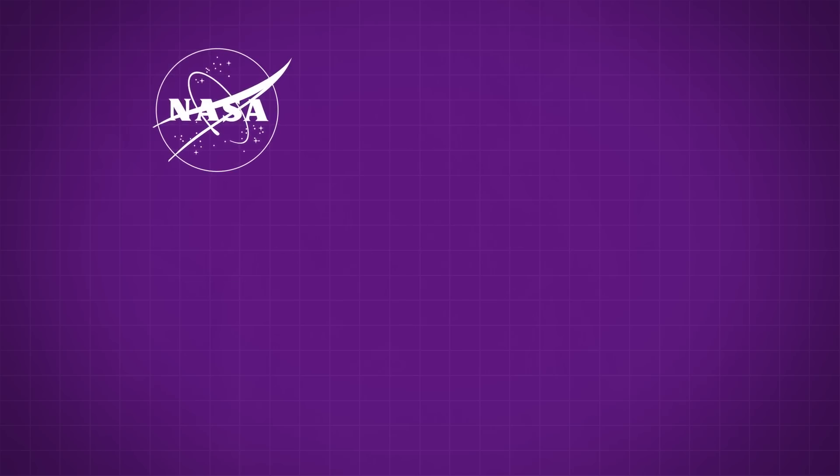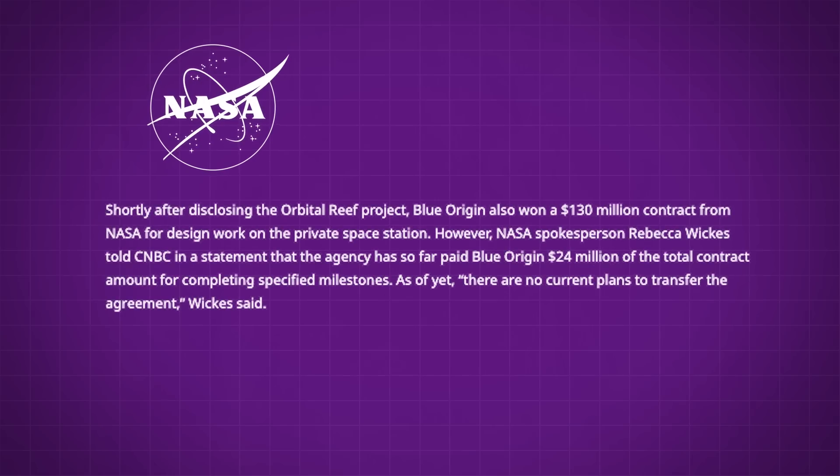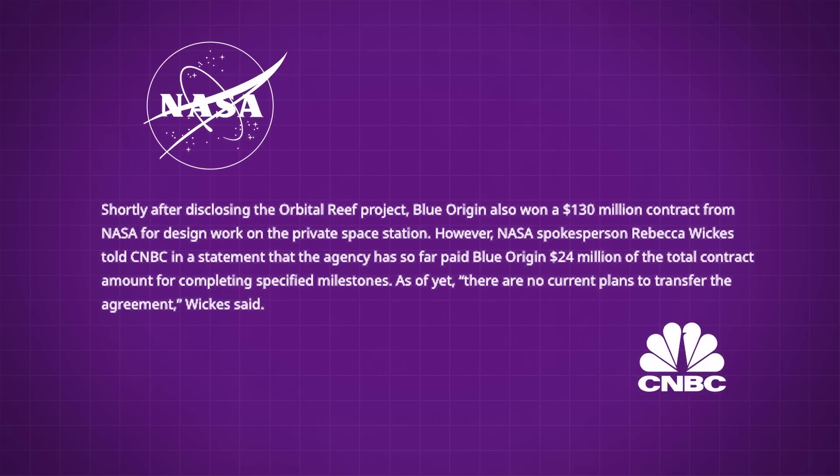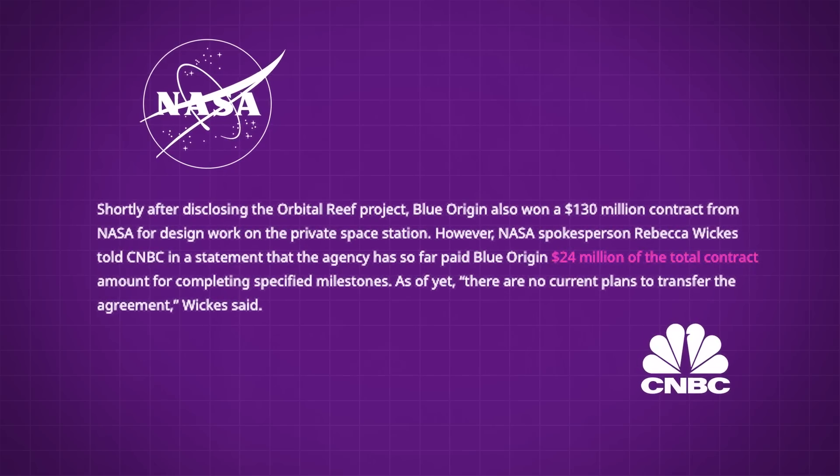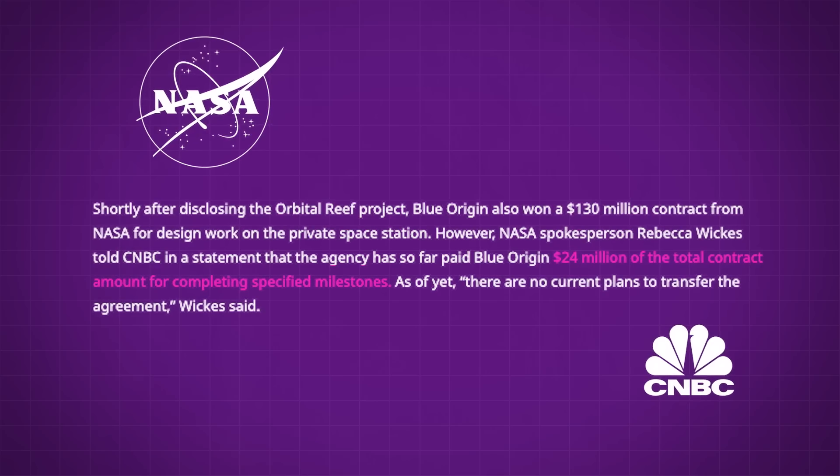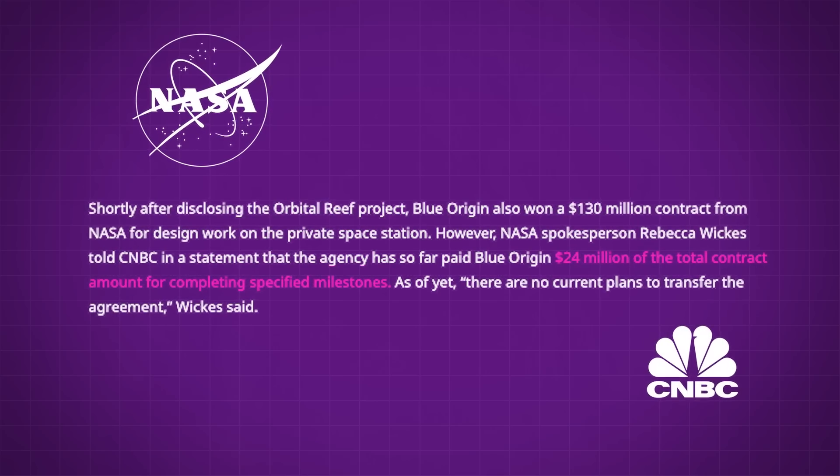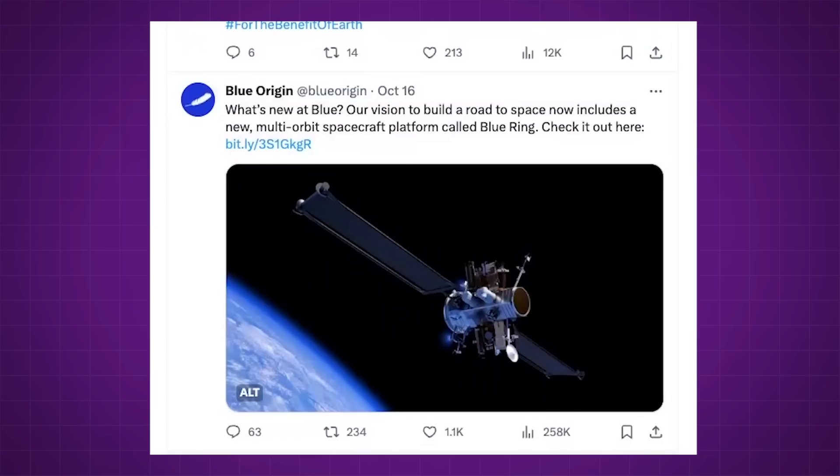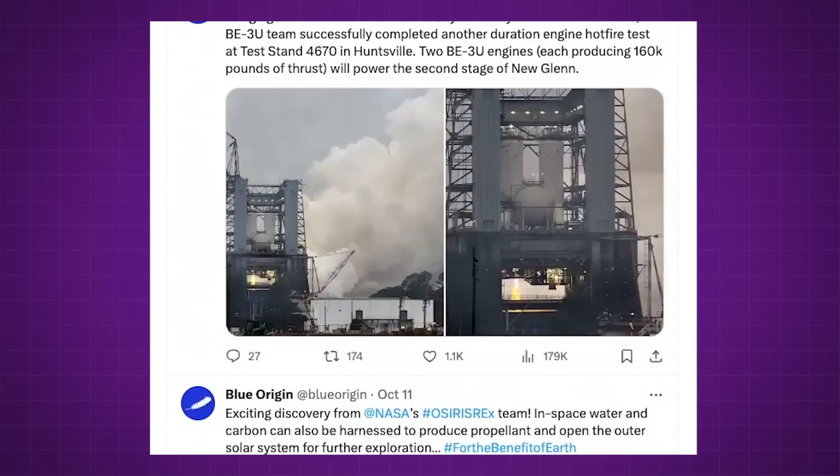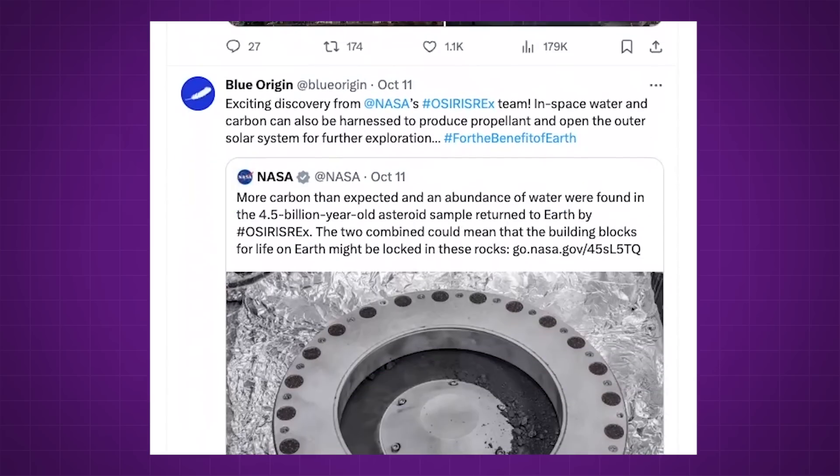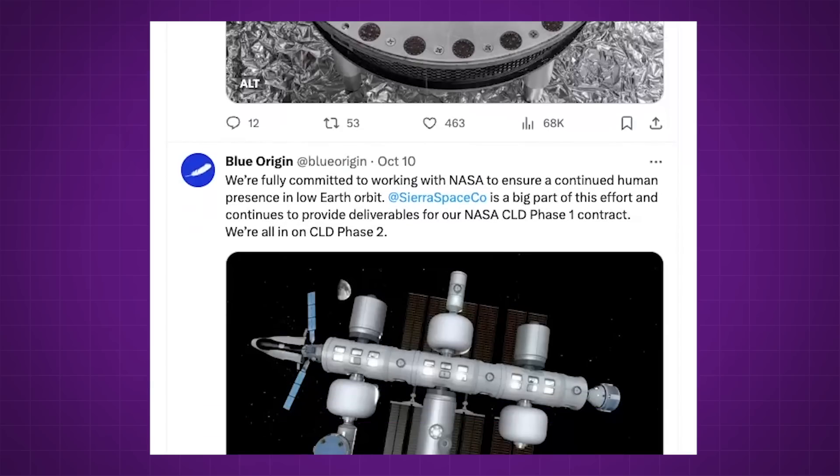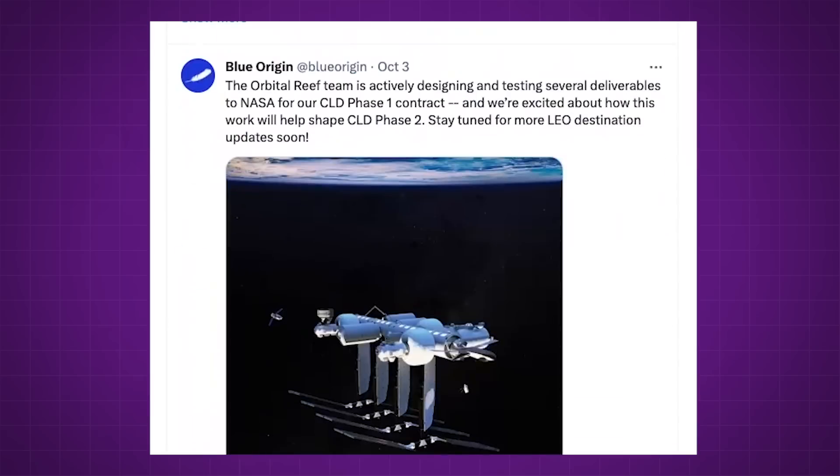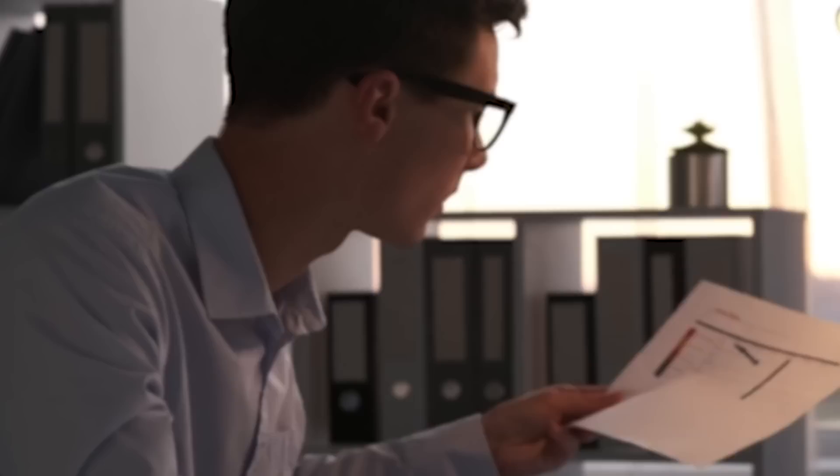When NASA was asked for comment on the situation, their spokesperson Rebecca Wicks told CNBC the agency has so far paid Blue Origin $24 million of the total $130 million contract amount for completing specified milestones. So, looking again at the social media posts and how often they reference NASA, it's pretty clear that Blue's primary concern right now is making sure that NASA doesn't cut them off from the remaining $100 million of taxpayer money.